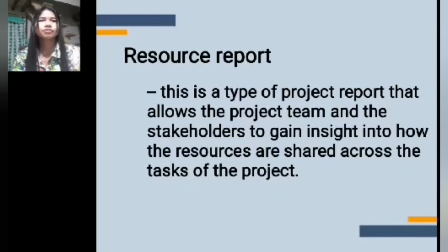Resource report. This is a type of project report that allows the project team and stakeholders to gain insight into how the resources are shared across the tasks of the project. So the project resource report will show the breakdown of which project team member is allocated to which task on which day. The project resource report is useful for highlighting the problem of overallocating project resources.